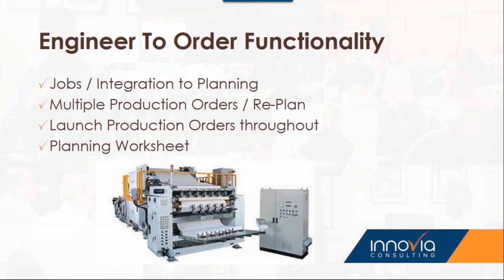Plus, jobs can track the hidden costs, like maybe you had to fly out for a meeting and you want to charge it on there, those kinds of things for analysis. So jobs might be a friend of capital equipment because you can push items from jobs into the planning worksheet. So I can get those 25 modules I need into the planning worksheet